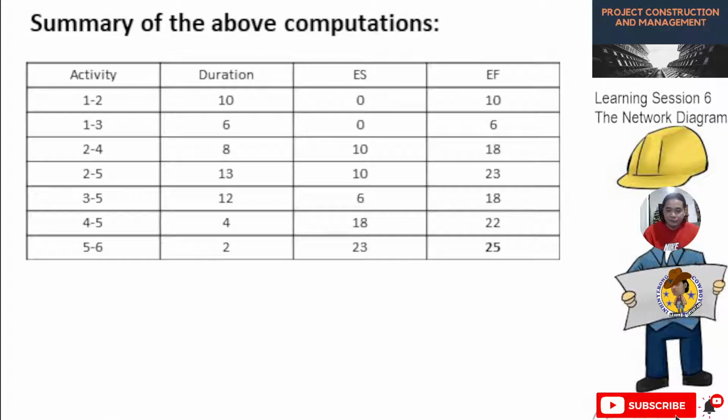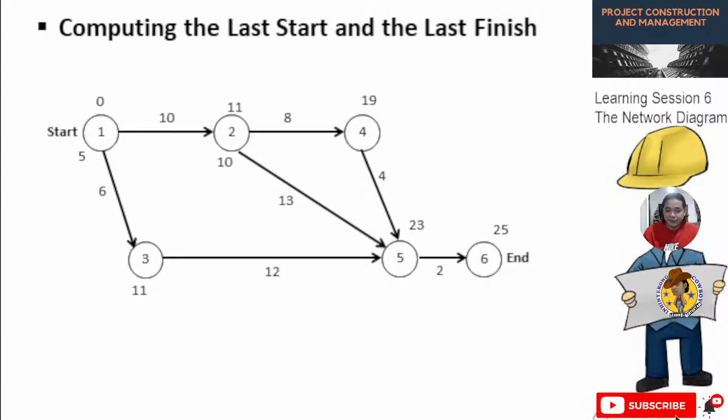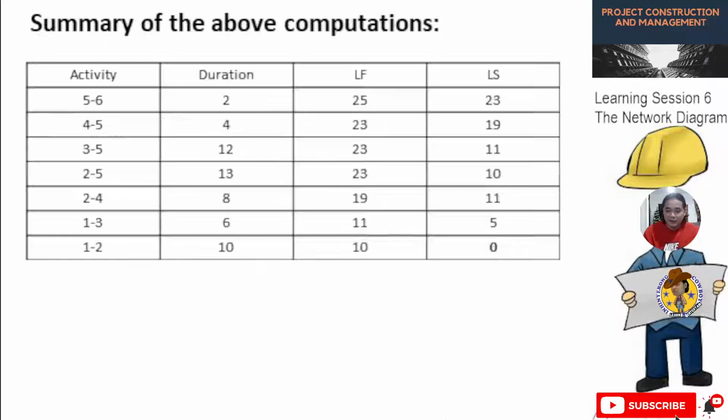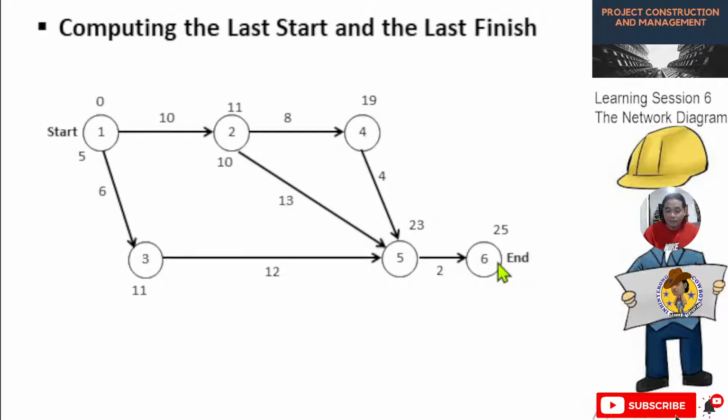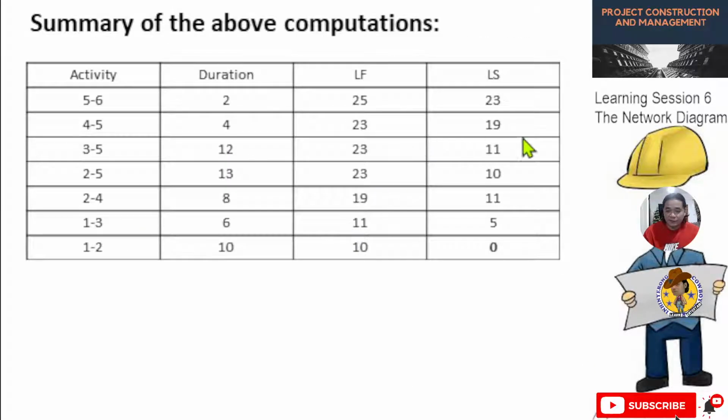For the last start and last finish, you are going backward, from the end to the start of your project. So this is the tabulated figures for the last start and last finish.